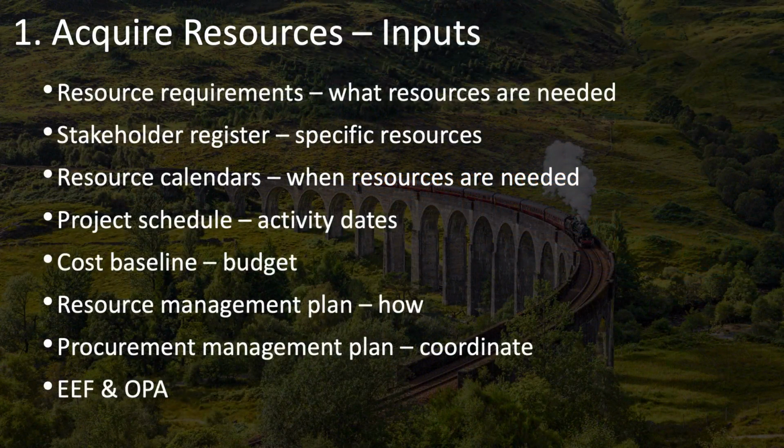The inputs to the acquire resources process, starting with the most relevant, are the resource requirements, which specifies what resources you're going to need for the project, as well as, surprisingly, the stakeholder register, because this may include some specific resources that stakeholders have requested to be on the project. Your resource calendars are what show when you need different resources on the project. The project schedule shows specifics for start and end dates of activities.